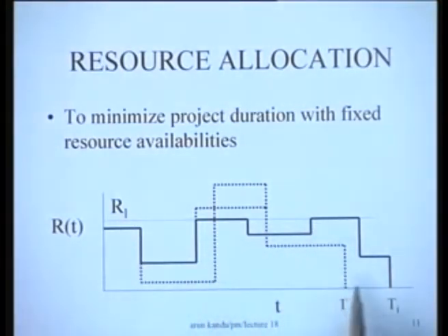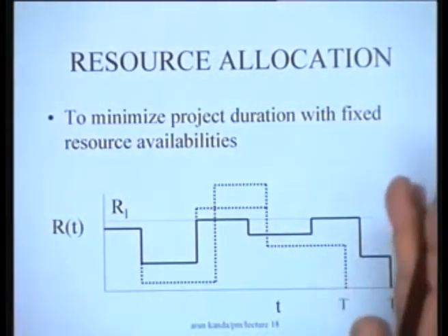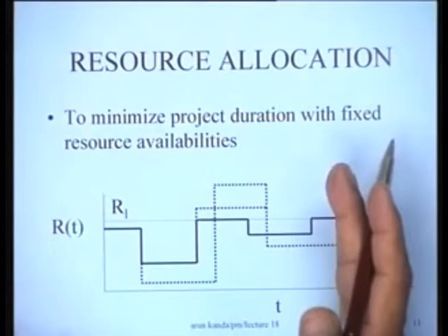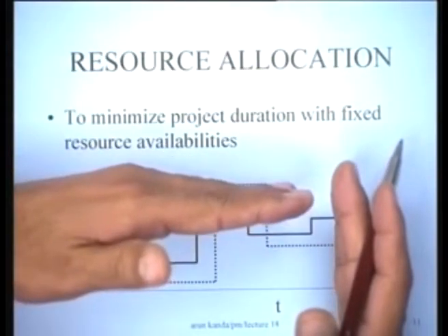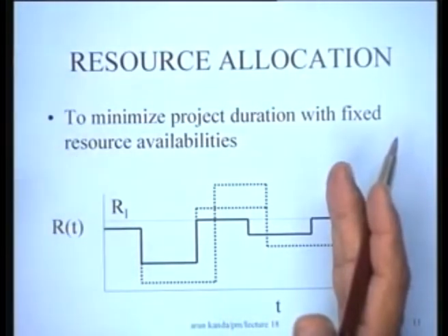And in this process, we are trying to ensure that the increase in the project duration is in fact a minimum. You can imagine something like this, that when you talk about resource leveling, you are holding this duration here, as it were, with a plunger and trying to push it from the top without allowing the plunger to go to the right. That is what resource leveling is all about.